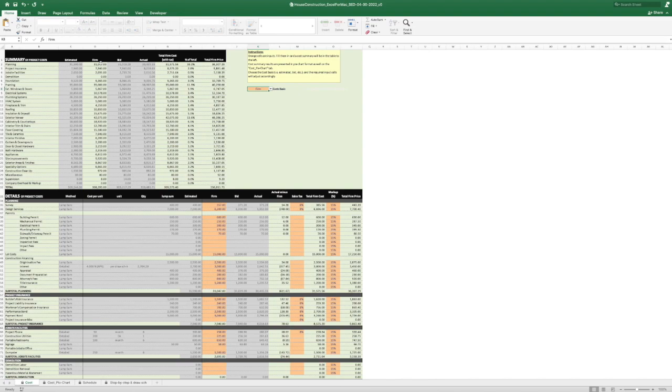And then if we click through to the bid, like if you actually get a hard bid from a contractor, and he's thinking, all right, this is it, we're going to build this now, then you can see how the cells will adjust for that as well, and it'll show you what it's summarizing here. You can see even the titles will update: total bid cost, total bid price.